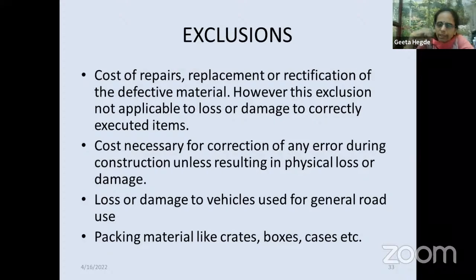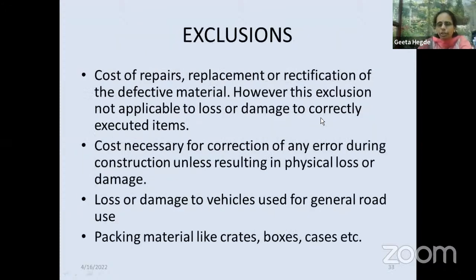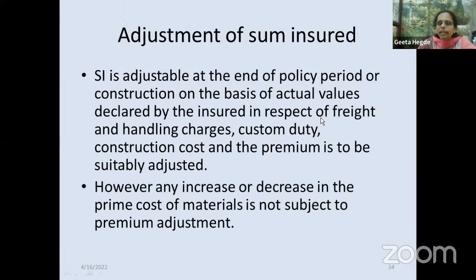Loss or damage to vehicles, packing materials like crates, boxes and cases is excluded. It's only the material required for construction that gets covered. Adjustment of sum insured, one important clause. Sum insured is adjustable at the end of the construction policy period on the basis of actual values declared by the insured in respect of freight and handling charges, custom duty, and construction cost, and the premium is to be suitably adjusted. However, any increase or decrease in the prime cost of material is not subject to premium adjustment.